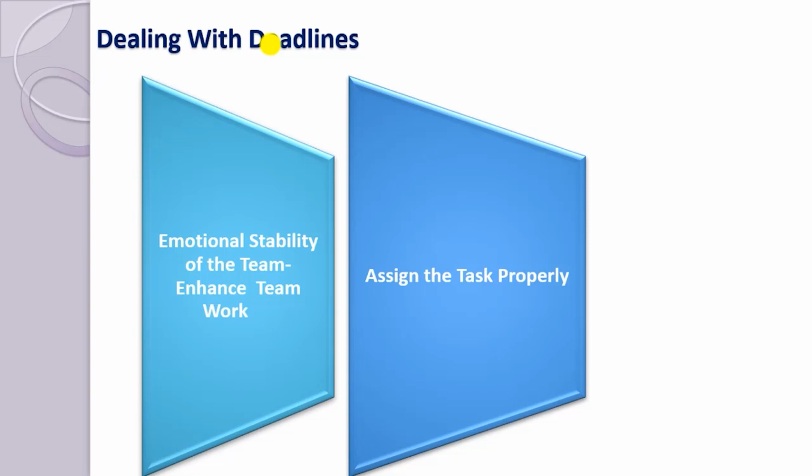Usually we say that we have to gather requirements and then estimate. But in real-time scenarios, many times the client gives you the deadline. Ideally, you will work out how long a project is going to take, having gathered estimates, added contingency and considered the risk. Then define the schedule and derive the estimated project deadline.